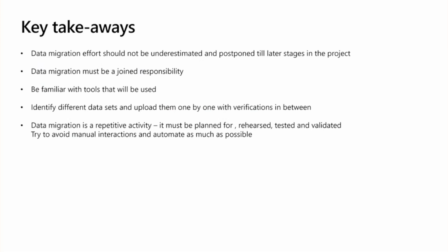It needs to be rehearsed, the data migration. The data that is uploaded needs to be tested and validated. And typically you expect that the first run will have some major issues, so you will have to rerun it a couple of times before you get a data set that is acceptable. It is essential that your data migration is done correctly, because if you go live on data which is not correct and you start doing transactions, and then you need to correct the data which has those transactions already, you can end up in really nightmare scenarios.